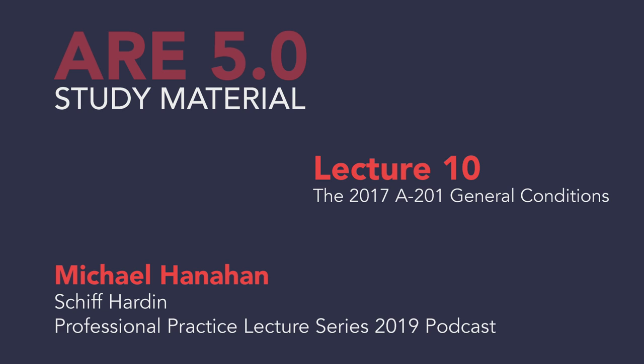And that's what's in 5212. Sub-subcontractor is a person who has a direct or indirect contract with a subcontractor. So as it goes downstream, it's tiers. Top tier contractor, only the first tier below them is a subcontractor. That's it. Any of the tiers below that first level subcontractor, because it says direct or indirect, under 3512, anybody in the tiers that you go down is going to be a sub-subcontractor. It's just for definitional understanding when you're reading through the document of who's obligated for what. Okay?